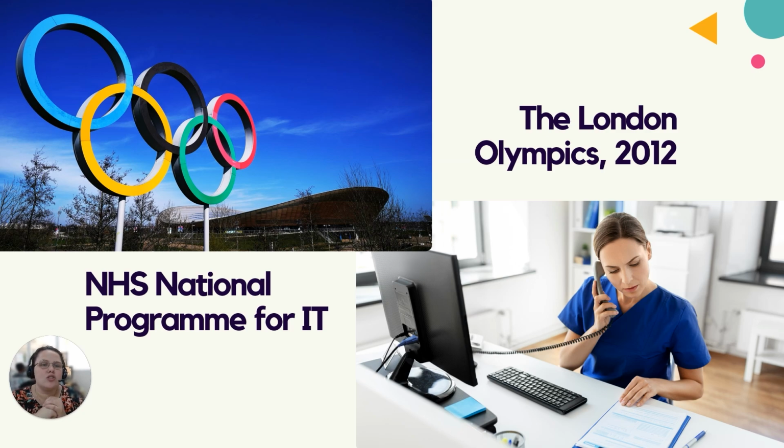Okay, and then lastly, the scope of the NPFIT was extremely ambitious, aiming to transform the entire IT infrastructure of the NHS in a relatively short period. So PRINCE2 emphasizes managing project scope and breaking down projects into manageable steps. Now, the failure to break the project down into smaller, more manageable components contributed to delays and cost overruns, essentially what we would refer to as scope creep.